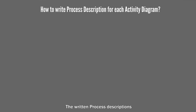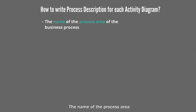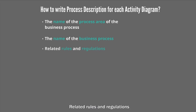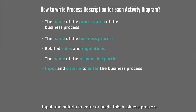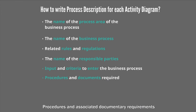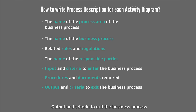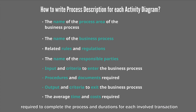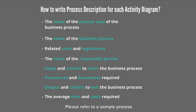The written process description must include the following elements: the name of the process area to which the business process belongs, the name of the process, related rules and regulations, name of responsible parties, input and criteria to enter or begin the business process, procedures and associated documentary requirements to complete the process, output and criteria to exit the business process, and the average time and cost required to complete the process and duration for each involved transaction. Please refer to a sample process description from the UN/CEFACT BPA guide for further details.